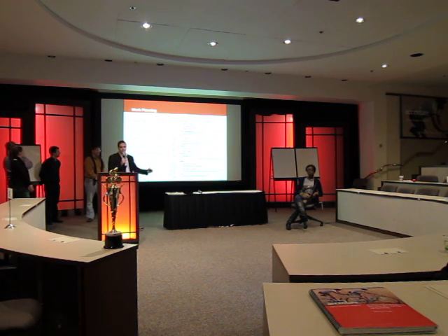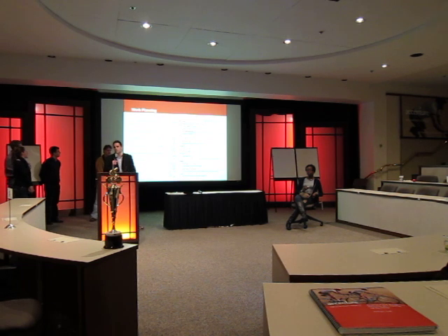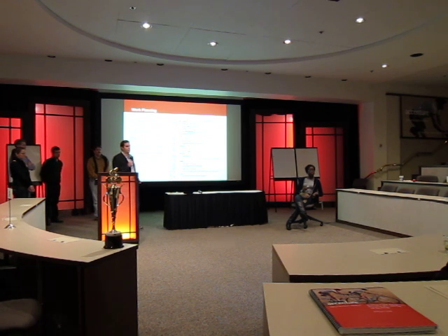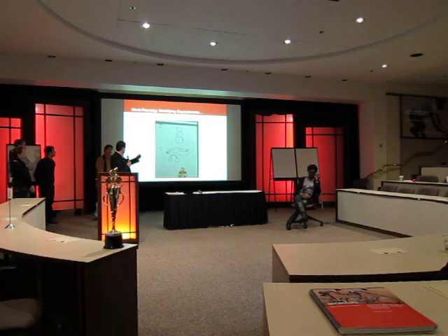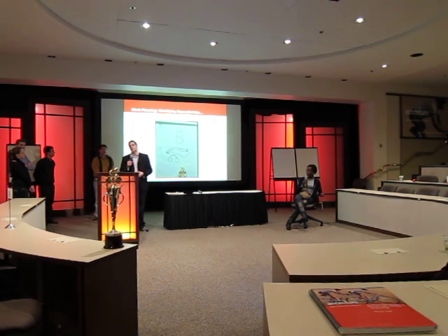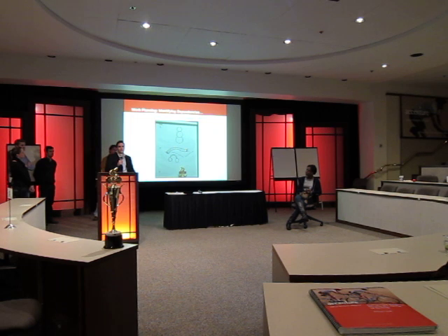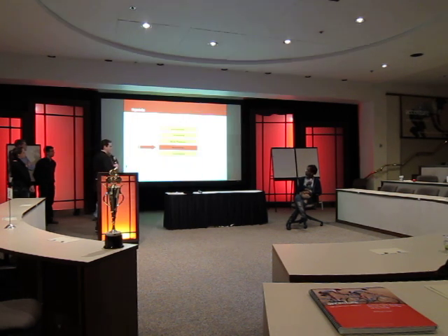So just an example, as we were creating the work plan, we realized that some activities had been done the day before we were actually creating the snowman, because we had to identify what accessories we were going to bring in to actually dress the snowman in. And it's also important in determining what are predecessors and what needs to occur before other activities can happen. So obviously you can't put the head of the snowman on until the body's built, you can't put the scarf on until the head's there, etc. So work planning, though not the most exciting thing, also is necessary to deliver what we say we're going to deliver on time. Now we're going to go through monitoring.